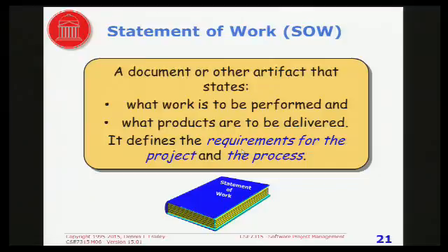And I like to think of it as the requirements for the project and the process. It's not the requirements for the product, which are usually in a requirements specification or something like that. It's the requirements for the project. You're to do this, you're to deliver this, you're to meet this schedule, you're to follow this standard, whatever it might be.